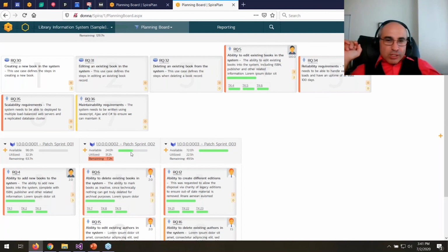In this option, the user stories and their story points are converted into hours by using the team velocity, and we then add on the tasks, the test cases, and the incidents to give you a total effort. And you can then compare that to the amount of time in that release based on the dates and number of people.